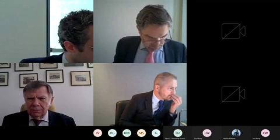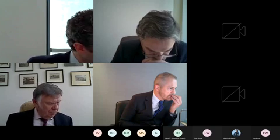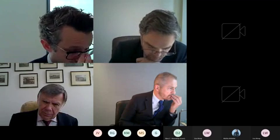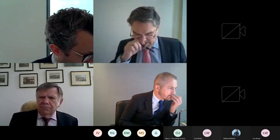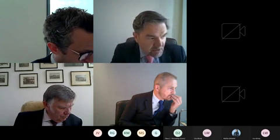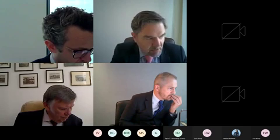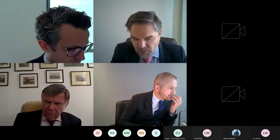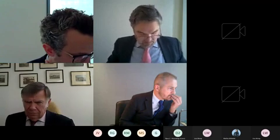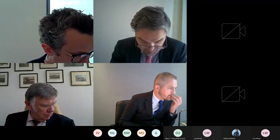Okay. So if you go to E34. Yeah. And what you have, and I don't know whether you've seen the model, which was actually the access model which drove these figures. What you have in the case of the residential, we have a makeup of different unit types. So studio, 1 bed, 2 bed, 3 bed. Up until the 3 bed, each unit would command 1 car parking space, and then a 3 bed would command 2. So you can do the calculation on that against the keys. It's actually units, and that's how you derive that number.